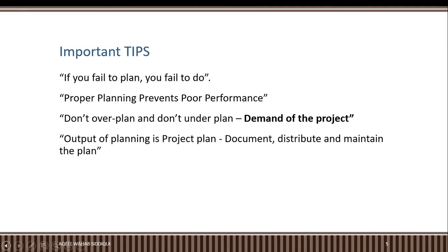So we gather requirements from the stakeholders through different tools and techniques like brainstorming, interviews, facilitated workshops, and observations. Since we have so many tools and techniques to apply, we produce requirement documentation, and each and every requirement we correlate with the project objectives. So all these are part of the requirements process.